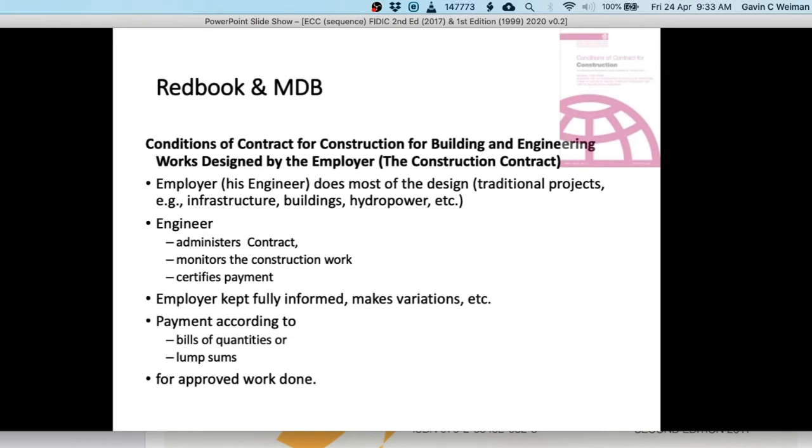And the payments are done here in what are called interim payment certificates. He will sign these certificates as certificates of payment. These, of course, are liquid documents, a very important document for a contractor, because if the contractor does not get paid, he can normally action those certificates as liquid documents in very specific type of court procedures created for liquid claims.